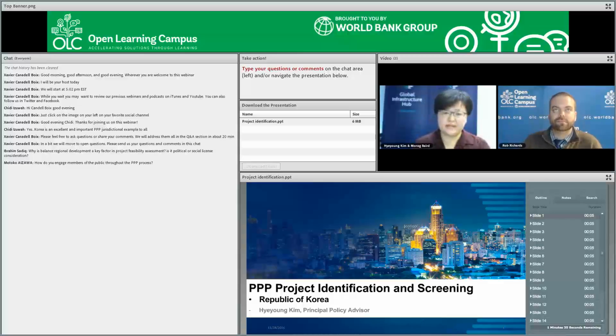In the Korean market, the user-pay type PPP, we call it BTO. Most projects are implemented as unsolicited projects. So almost 90% of BTO projects are unsolicited projects. And we also have some unique developments in the unsolicited project scheme.